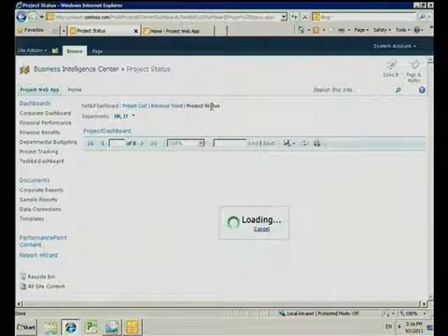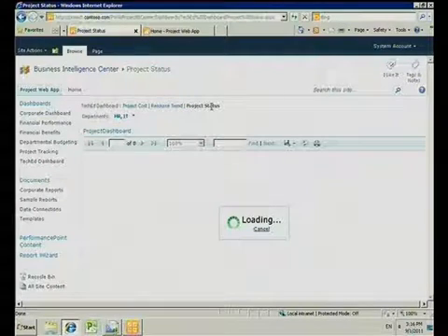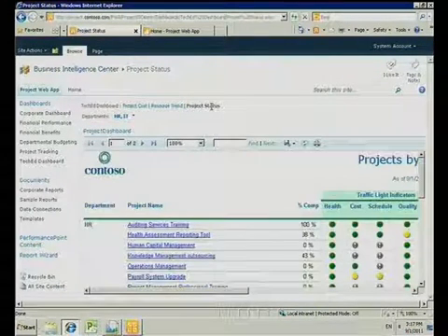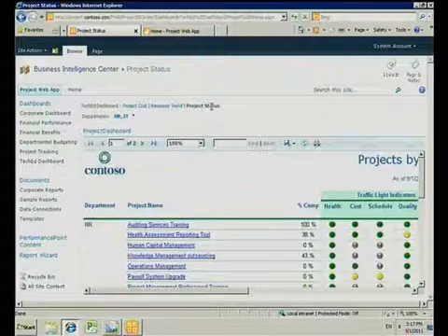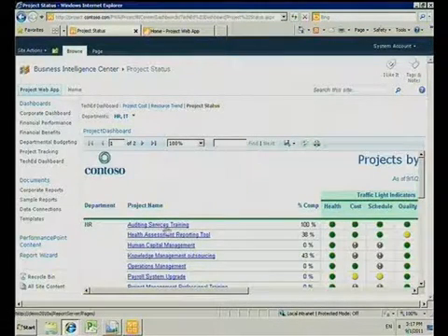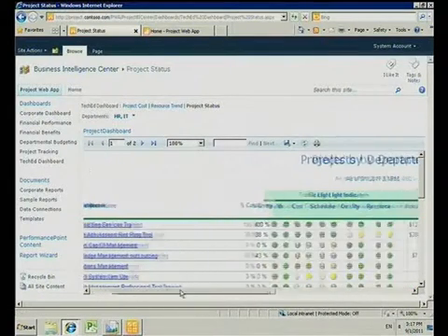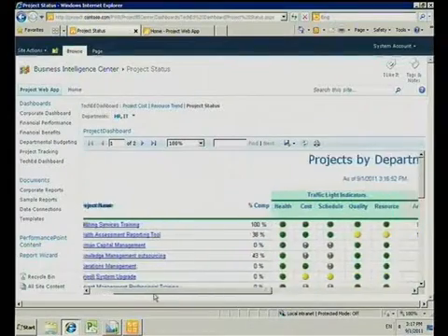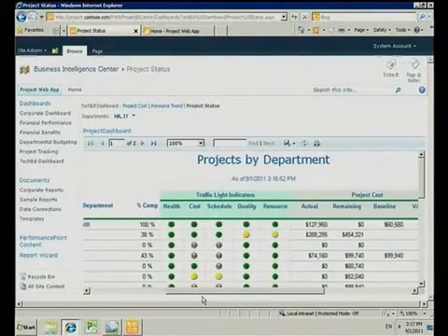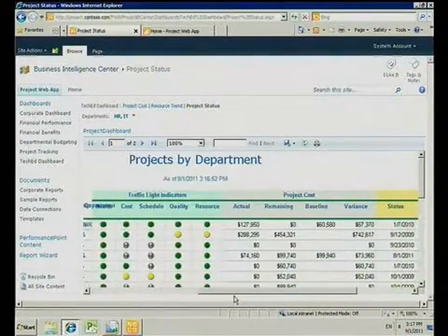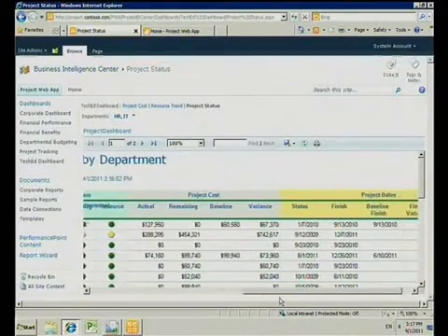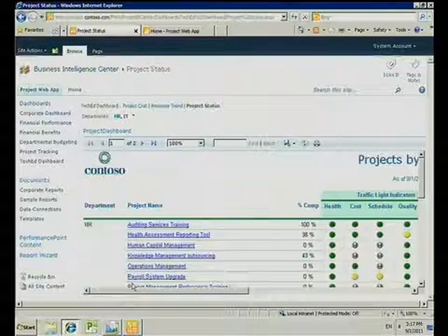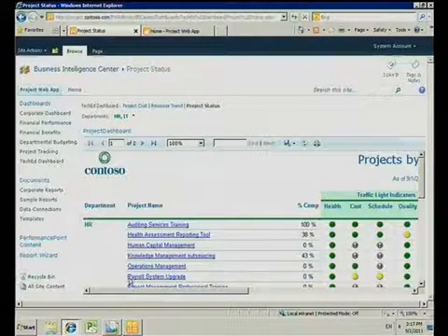And then of course we also want to be able to create status reports, or dashboards, or let's call them status reports that are printable. Now, in order for us to do that, we need to utilize again the right technology. And I must apologize for the screen resolution. I need to scroll a little bit. But this particular report allows me to have a very quick overview per department of what my projects are, the percentage completed, the general health, their associated dollar values, and also their associated dates. That's generally the type of information that executive program managers are interested in.